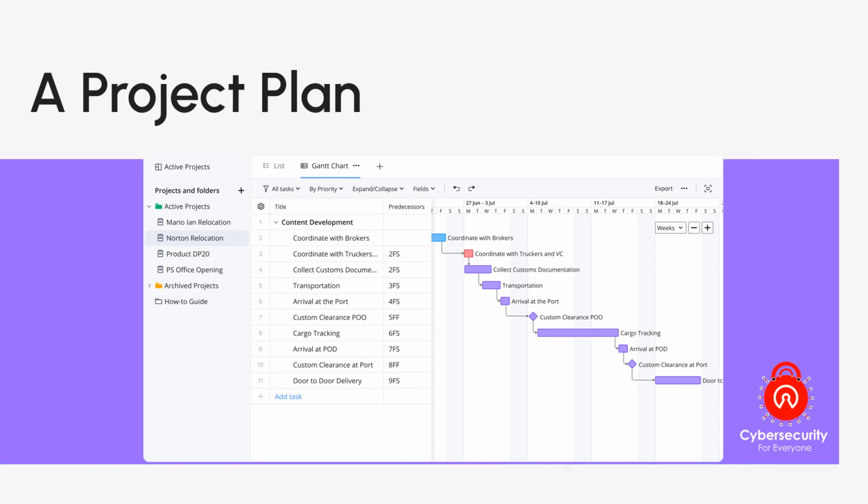This is an example of a project plan. The work breakdown structure, which includes the task, resources required, the start and end dates, and the estimated effort in hours. The WBS also includes the estimated capital expense, non-capital expense, and dependencies. When working on a project, we should consider the following: 1. Financial, 2. Priority, 3. Time, 4. Schedule, 5. Staff, 6. Procurement, 7. Organizational feasibility, and 8. Training.